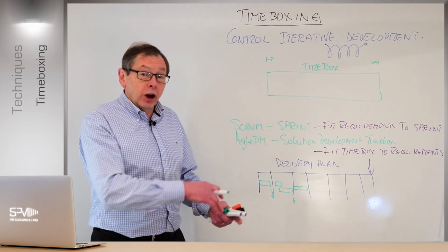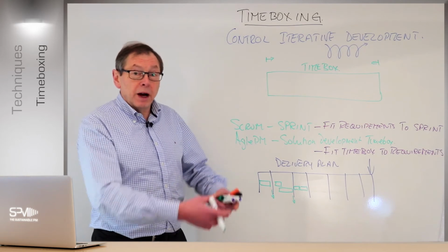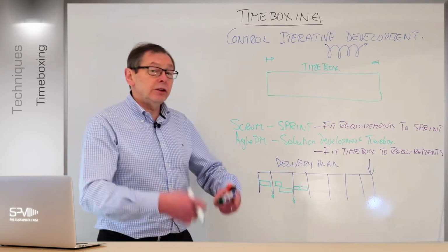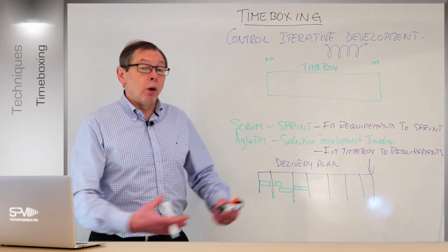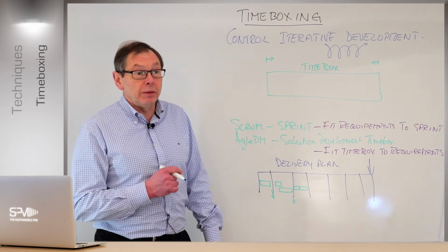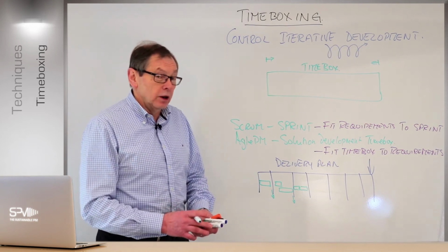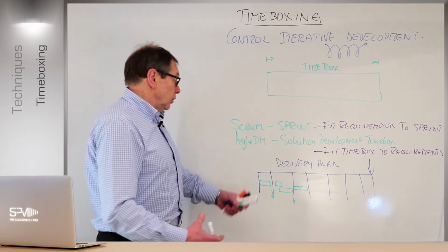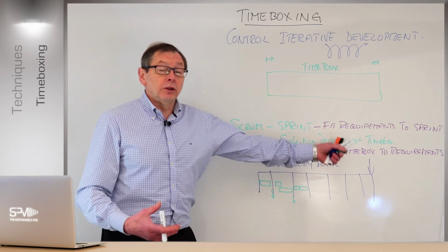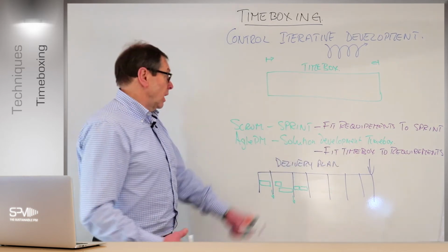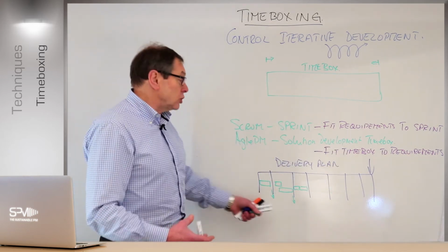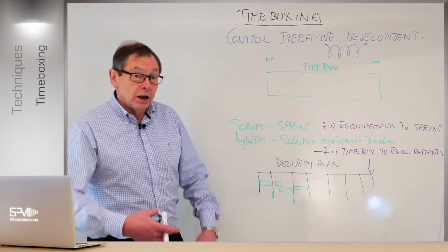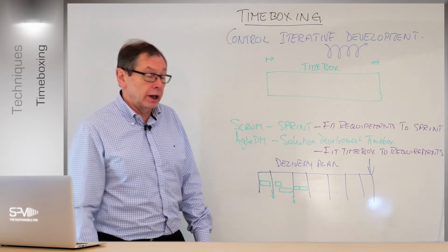In the meantime, we followed up with the silver group and then the bronze group and made sure they all worked independently. And that's what we were doing, releasing those to make sure they all worked independently and then bolting them all together to make sure they all played ball on the same network. That's usually a big test as well. Great when they work on their own, but we want to make sure they worked on the prioritization afterwards. So again, that was releases of subsets of the solution as we went through the project, as much as we do the build itself. And each time allows us to incorporate any change that we need to have, feedback from the business, feedback from the solution going out there.